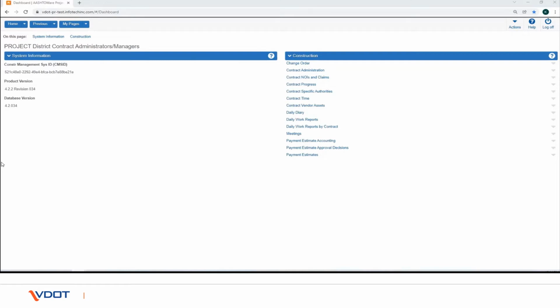Depending on the type of schedule selected, you can track the % of work complete for designated time periods, the % of critical items completed for designated time periods, or % of work complete only on the final day or date.